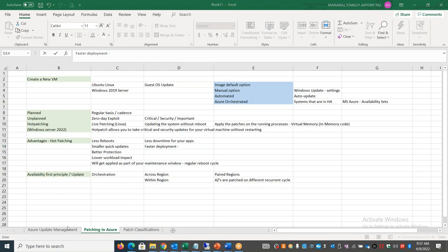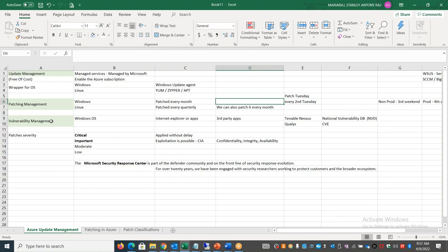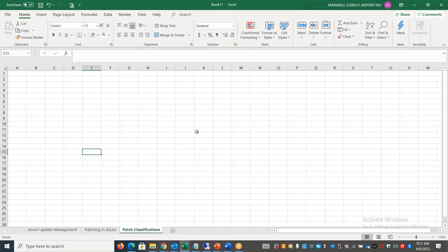Log4j comes under vulnerability management. As senior people, you have to be very clear when taking up the work, right? Some people will try to push the vulnerability handling work as part of your regular patching work. That is going to increase your workload, and it also needs a lot of due diligence, because it might impact your application's functionality also. If you are just touching some of the Windows OS level things, it might also impact the application, but we are taking a regular downtime, and you're doing it in a planned way. So you have to be a little careful with accepting vulnerability handling. But again, in some cases like Log4j, we had no options, right?